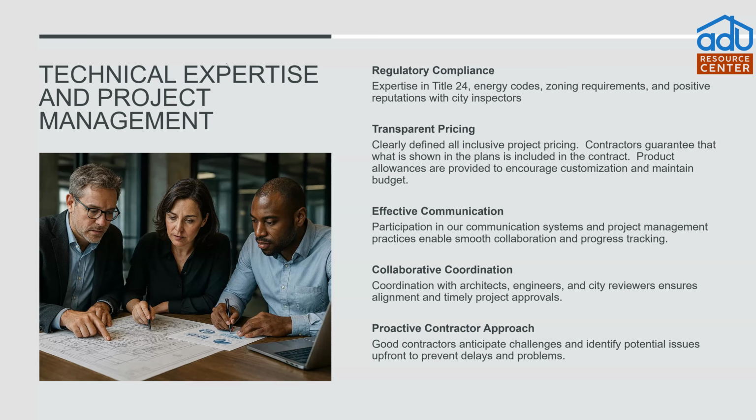But other than that, everything should be turnkey, except exterior landscaping and hardscaping. That's just because it's really beneficial to have the ADU in place to see the scale of the building before designing the exterior, how the exterior and the plants are going to look. At least have framing done before we get started on that portion of the project. One of the other things that's important is to have allowances in the projects.